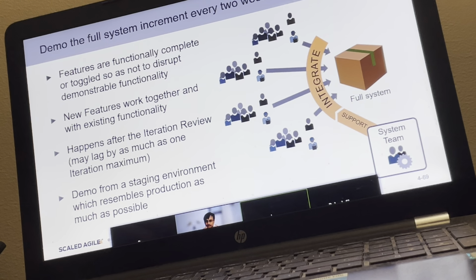The capacity which you are planning in a PI planning meeting is for the new work. We are not saying that's your total capacity. You can say this is our percentage capacity available for the PI planning work. I may have another capacity which might be going somewhere else, or you may have a dedicated team who is taking care of these issues only.